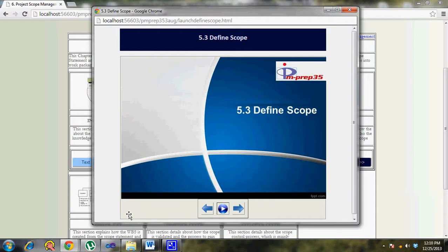So the acceptance criteria in this particular scope statement are a lot more relevant and important compared to what you have in your requirement documentation. Remember that when you define the scope, it's a lot more iterative in terms of understanding the context, the time available, and the cost available, and then you trim your requirements to decide these are within scope and these are out of scope, and you deal with only things that are within scope. If you go out of the way to do something for the customer that is not specified in the scope statement, then it is not called customer satisfaction, it is called scope creep. So that's where a proper understanding of scope is really important.